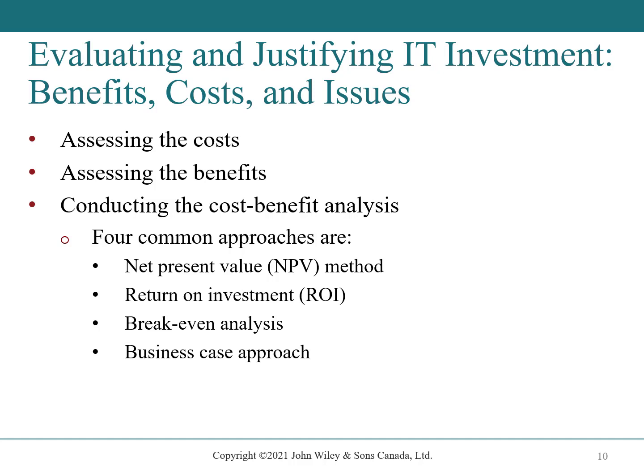Return on investment measures management's effectiveness in generating profits with the available assets. ROI is calculated by dividing the net income generated by a project by the average assets invested in that project. ROI is a percentage, and the higher the percentage return, the better.